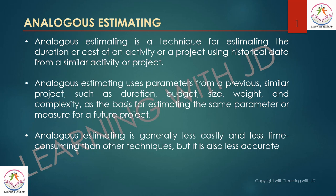Analogous estimation is generally less costly and less time-consuming because the data is quickly available, but it is also less accurate since you haven't done too much research. When informing a sponsor, manager, or stakeholder, you need to tell them you are using analogous estimating. From an exam perspective, if a question says you don't have much time, you search lessons learned, find a similar previous project, and need to pick an estimating technique — the answer is analogous estimation.